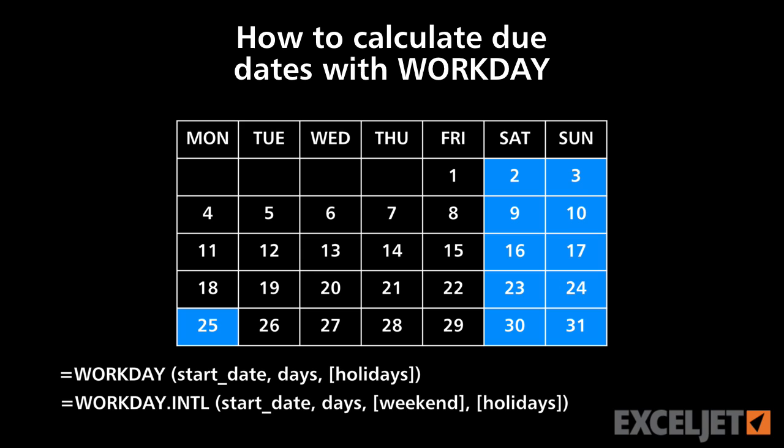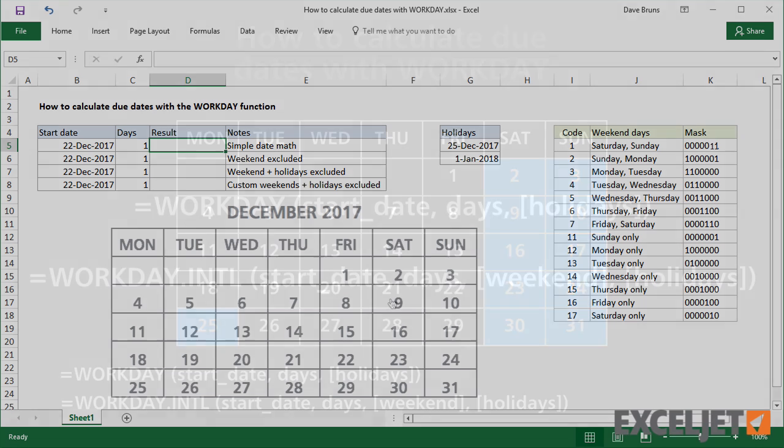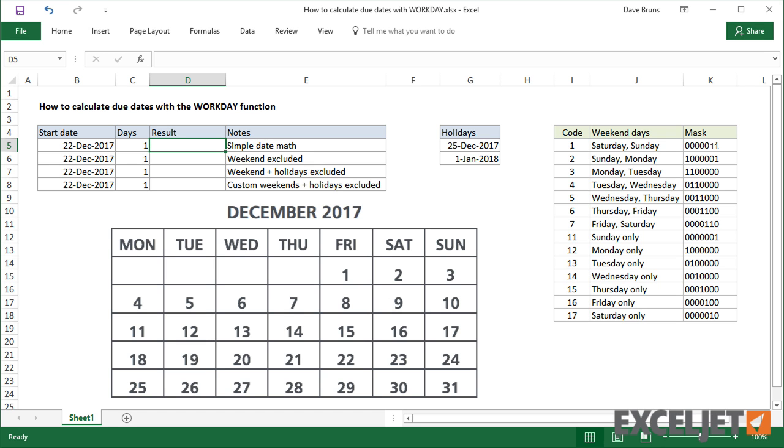The Workday function returns a date in the future or past that takes into account weekends and, optionally, holidays.